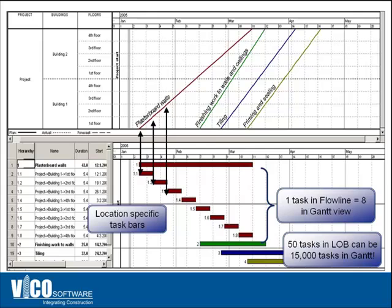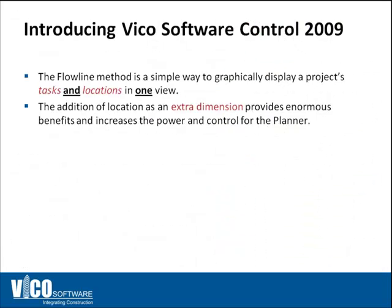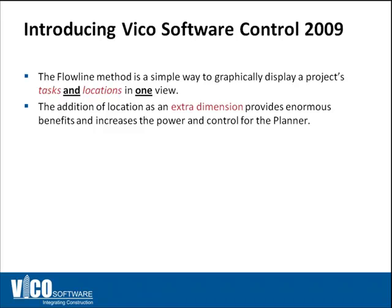So line of balance means the ability to graphically display tasks and locations in one simple view, as opposed to just an activity based schedule where you don't have locations represented automatically. Having location added as an additional dimension provides you a lot of benefit. It increases the power of control for the planner, creates a deeper understanding of the relationship between tasks, and the planner can see what's going on in the schedule at a glance.